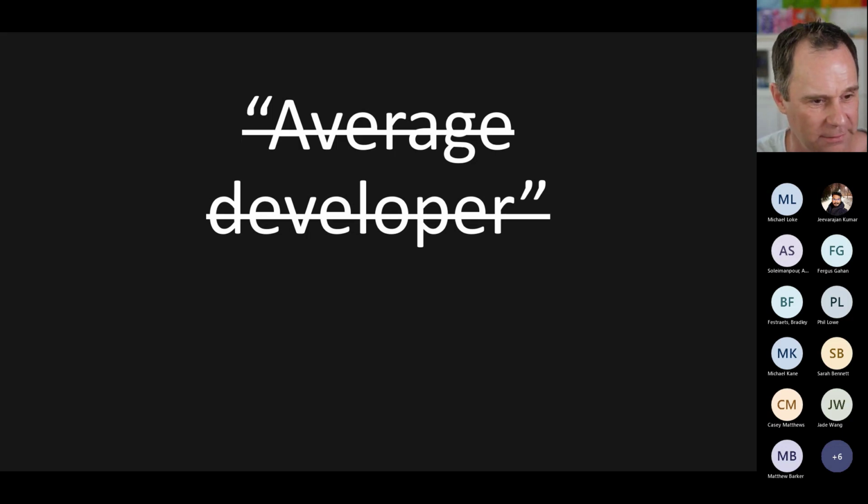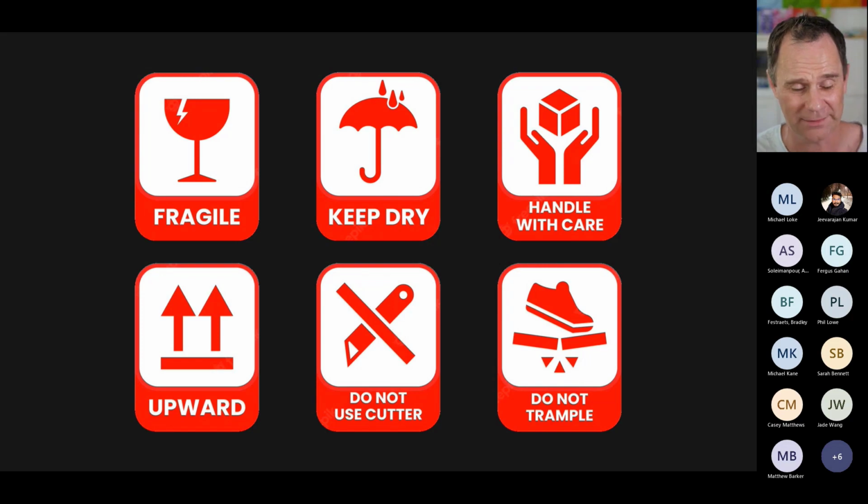Like I said, all we've done is take a bad guess and make it worse. Time-based estimates are also really fragile. Imagine halfway through your project, your investments in release automation in Azure DevOps or test automation begin to pay off. And all the time-based estimates you've factored into your project about how much effort it's going to take to do deployment to production every sprint, or how much time you'll have to spend doing manual test execution, are out the window, because now you've got all this automation that has really reduced that time down to a fraction.